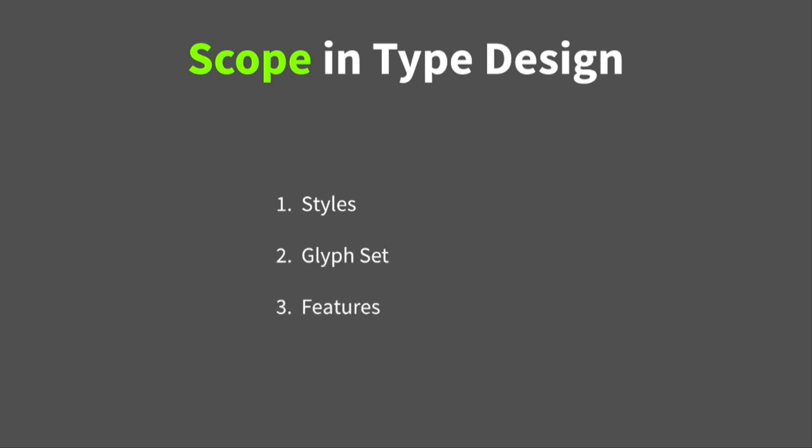Well, there's three main areas whenever you go to scope a typeface. That's styles, glyph set, and the features. And we were kind of estimating and thinking about how we could do this with Miguel's time, basically part-time, because he's still got other stuff to work on. We figured base style we could get done in about six months. A glyph set, we could make a glyph set edition as a module for three months worth of work. And the features, we'd be looking at about a month for, say, add small caps or old style figures.